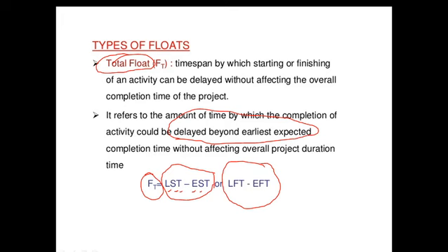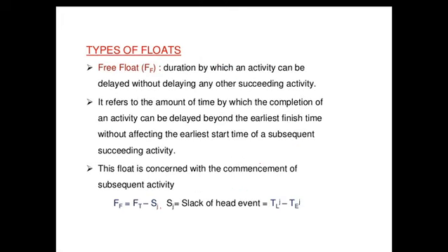Now let us see the other type of float, which is free float. What do we mean by free float? Free float is a duration by which an activity can be delayed without delaying any succeeding activity. More elaborately, free float is a portion of positive total float that can be used by an activity without delaying any succeeding activity.